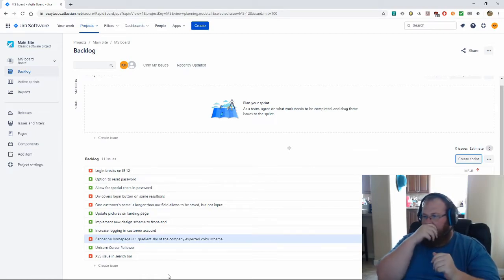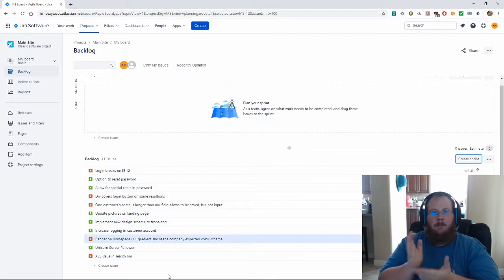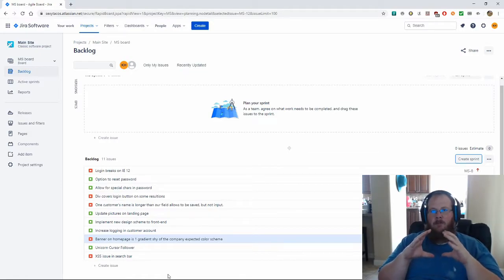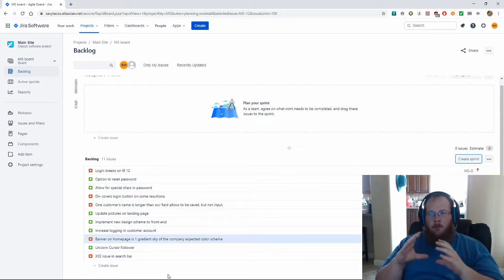Typically, what you would do is go into a planning meeting or an estimation meeting with developers, and the developers would discuss each of these tasks one by one and say, okay, based off of our understanding of what's in the ticket, we think it's going to cost this much time or this many units to do that. And the project manager has a velocity, basically a limit to the number of units that can be done in a sprint for those 2 developers.